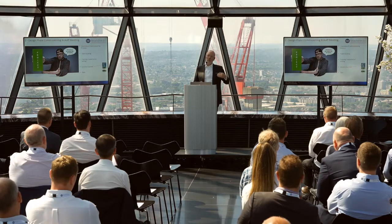For me, the commissioning kickoff meeting is like a project unboxing meeting. You get everyone in a room, because no one wants to be there, no one knows what commissioning is, and you just go through the project, you unbox that project, you go through the commissioning plan, you explain who's responsible for what, you go through the program, you go through who's got to deliver what at what stage, and then you have a Q&A. So it's part kickoff meeting, it's part